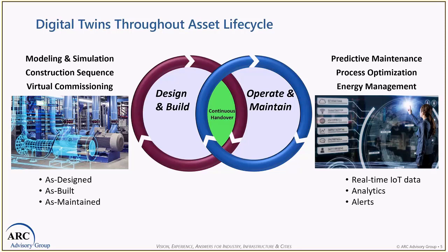All right. So for a moment now, I'm going to go back to the left side of this slide. What I talked about above is really the as designed and maybe getting into the as built model. We're starting to believe that the next step is to have this as built model become part of the handover process, so that the operate and maintain people can have models that better represent the as maintained condition of the asset.